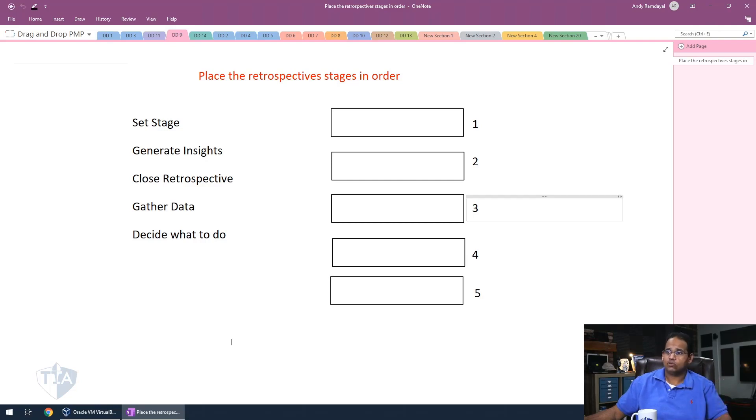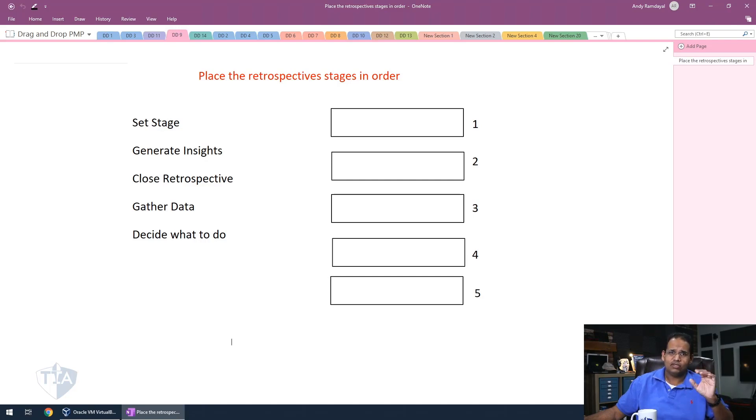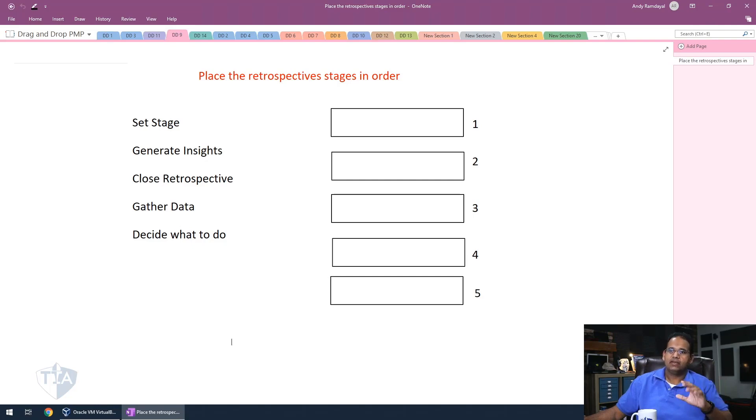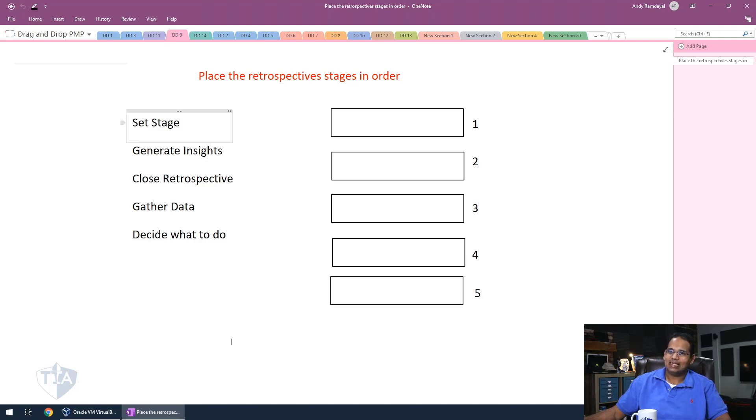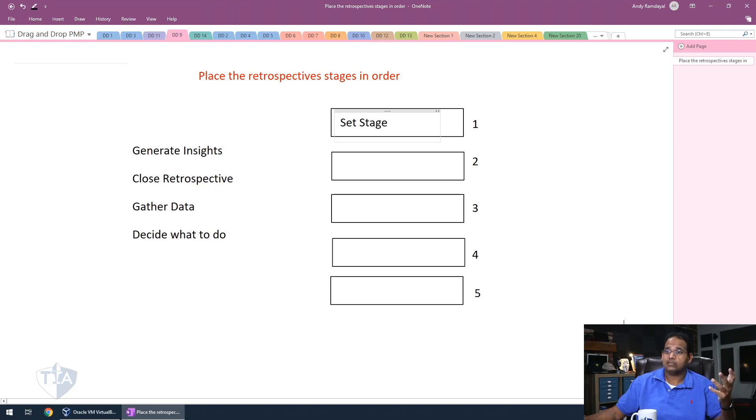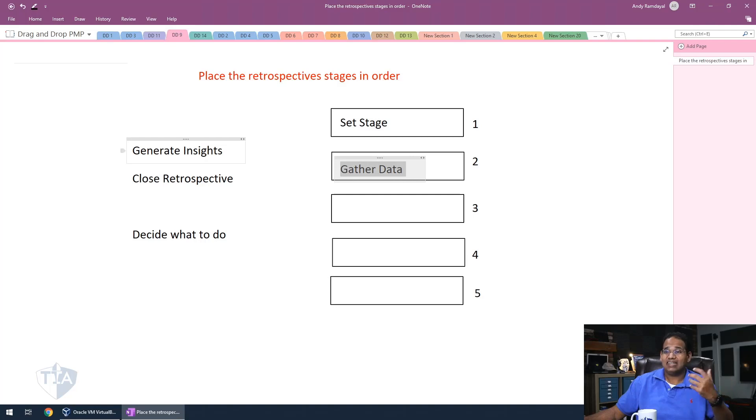You have finished putting these things in order. Hopefully you guys get this right. I do have a statement that I tell people to get this right. And that statement is set gathered good dog clothes. What that means is if you look at this and you try to put them in order, the easiest way to remember that is by memorizing that statement and you can easily put this in order. Let's put them in order first and then I'll explain what they are. So the first thing you want to do is you want to set that stage. So this is when you bring everyone in and let them know during a retrospective meeting that, you know what, we're going to be doing a retrospective. The next thing here is you want to gather data on what happened during that particular sprint. Once you gather the data, you then get to generate insight about that particular data, understand, analyze the data basically.